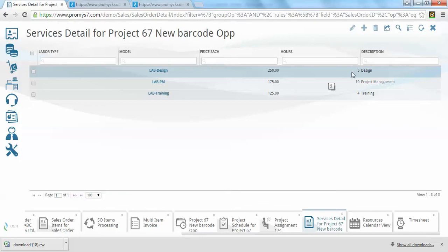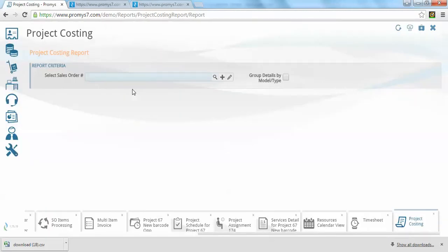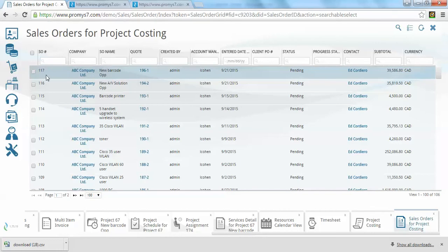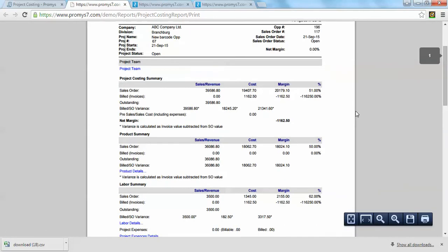And now I can cycle that implementation lesson learned back into the quoting process. And that's the project audit that I can do consistently that basically shows from a project job costing perspective, did I use more or less materials than I thought I would? Did I use more or less hours than I thought I would? And if there's overages or underages, where did those overages or underages come from?